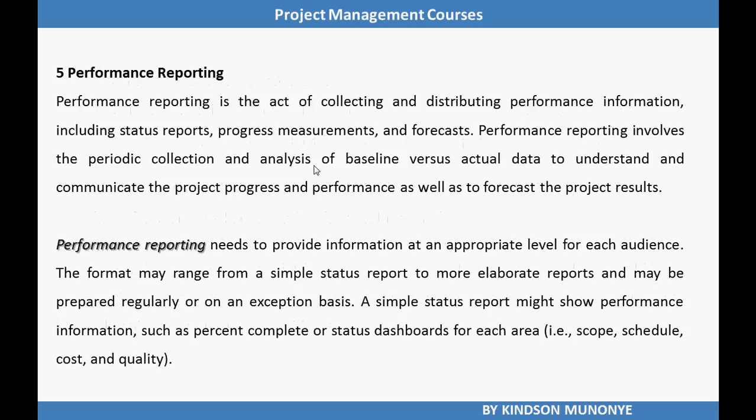The final tool and technique for manage communications we are going to look at is performance reporting. This is the act of collecting and distributing performance information, including status reports, progress measurements, and forecasts. Performance reporting involves the periodic collection and analysis of baseline versus actual data to understand and communicate the project progress and performance, as well as to forecast the project results.